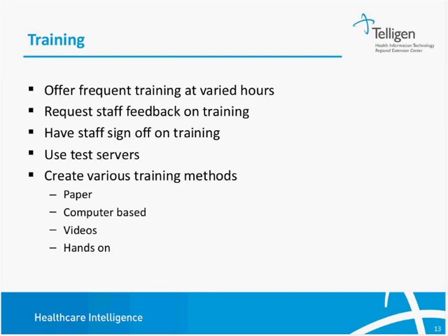Now moving on into training. It's very, very important to offer training at varied hours. A lot of times, especially in hospitals, you have staff that work different shifts, different hours, and having a variety of trainings available at various hours is very important. You can develop a training schedule for all shifts and then create a sign-up sheet for it and make it mandatory. It's important that all of your staff are trained with the same information from the beginning.